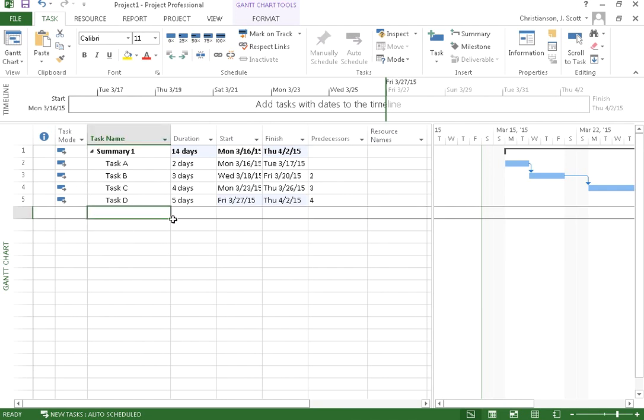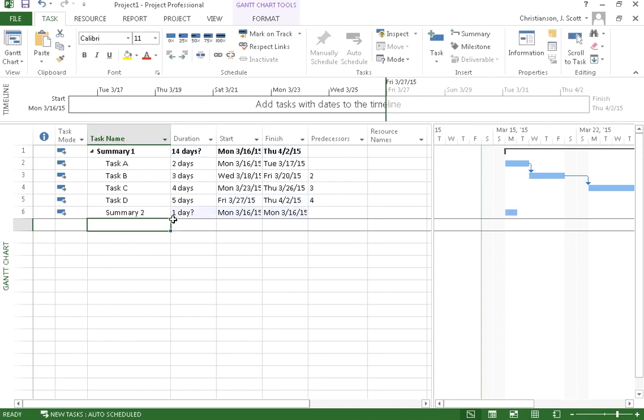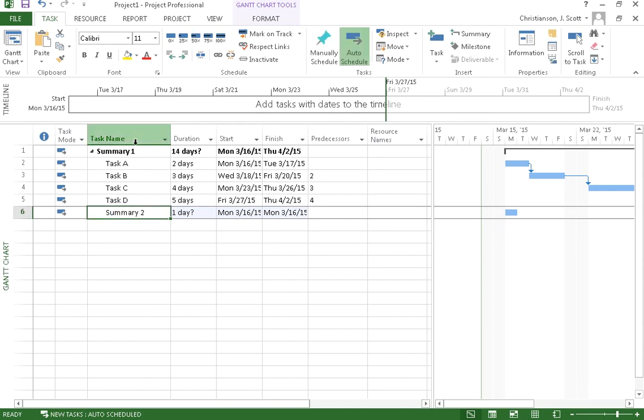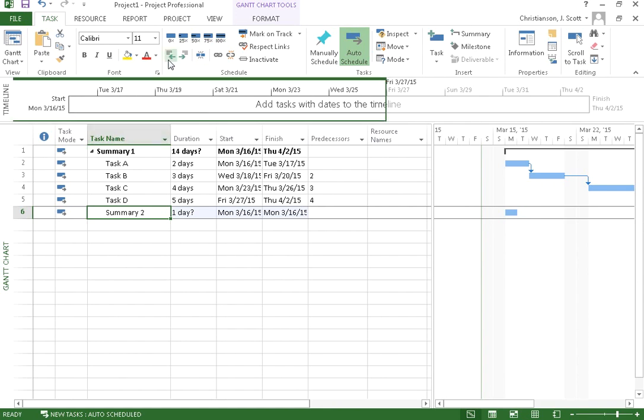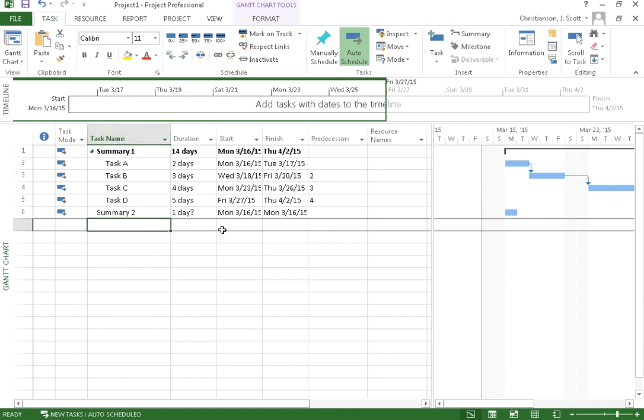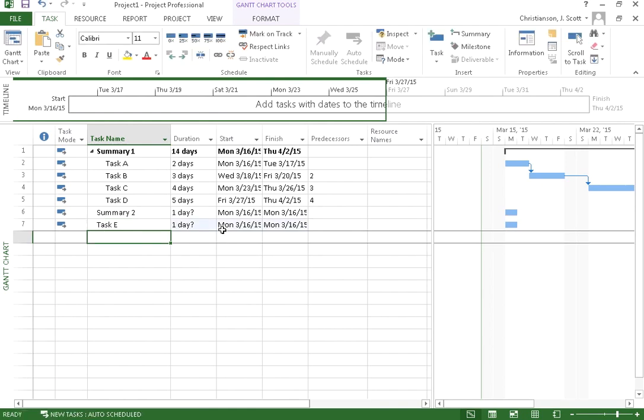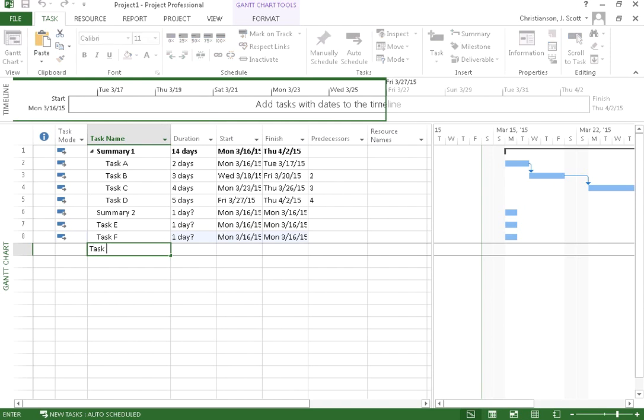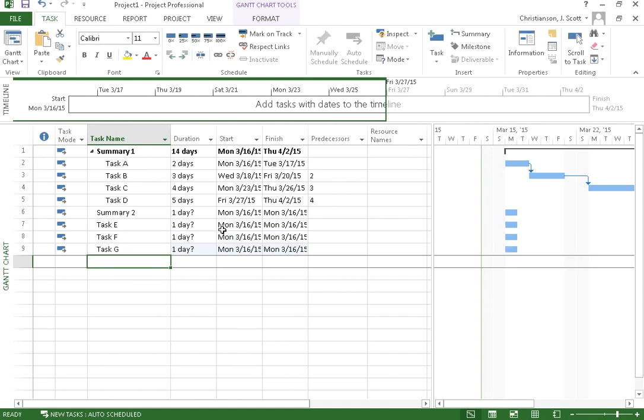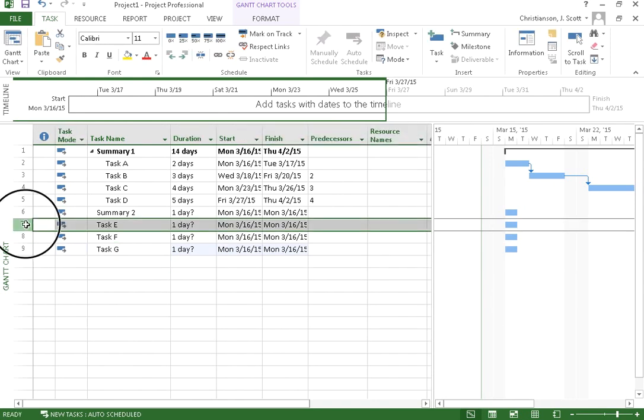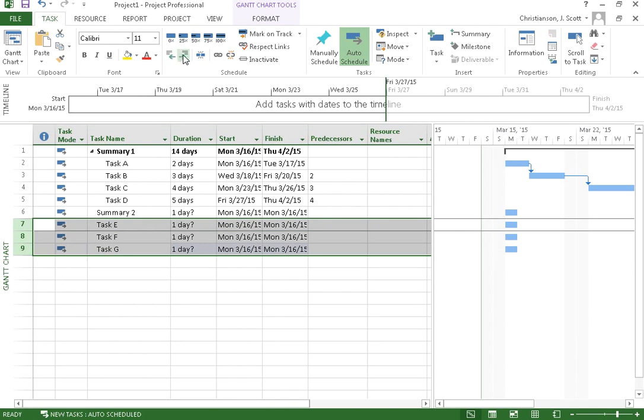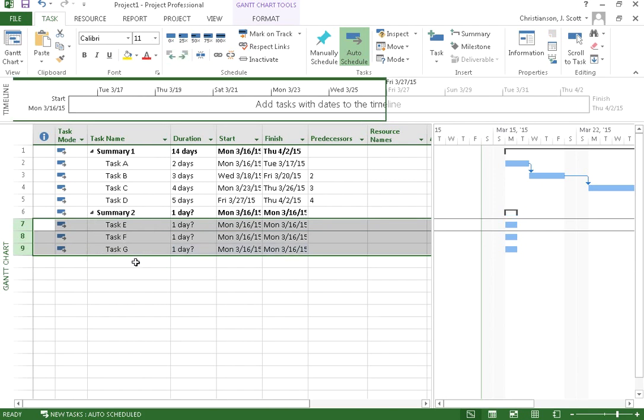I can then create another summary, say summary 2. And you'll notice that this is, because I'm creating it right after task D, it got indented. So I don't want this to be another task that's indented under summary 1. So I'm going to come up here, I'm going to outdent that. Okay? And then I'm going to say task E, task F, task G. And once again, I'm going to make these summarized by summary 2.